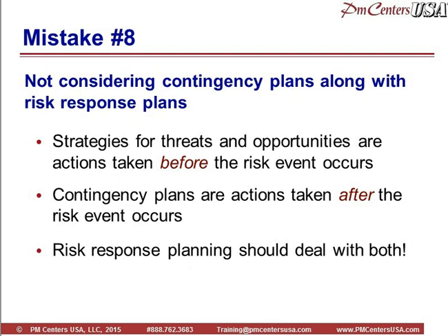Now, contingency plans are different. This is, okay, if this risk event occurs, what are we going to do? An example, again, I used to live in upstate New York, and did a lot of projects with construction outside. Let's assume I had a project where we're putting a brick wall on a building, and this is in early March. Well, early March in upstate New York can be quite nice, or it could be quite miserable. It could be snow, ice, sub-freezing temperatures. You just don't know. So a contingency plan would be arranging with local suppliers to have plastic sheeting and propane heaters available so I could build a shelter around the work area so we get that brick wall done, even if it's freezing temperatures.